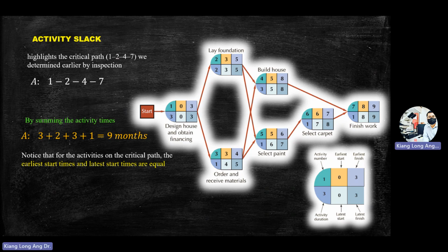So the important thing is that the earliest start time and latest start time, they are the same. Important is this one, not the other things. So the important word is here. It must be the same. Then it becomes critical.